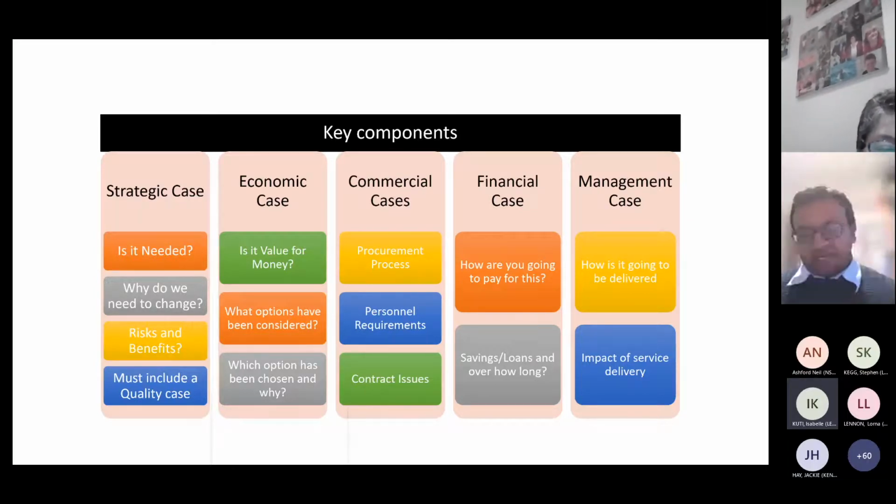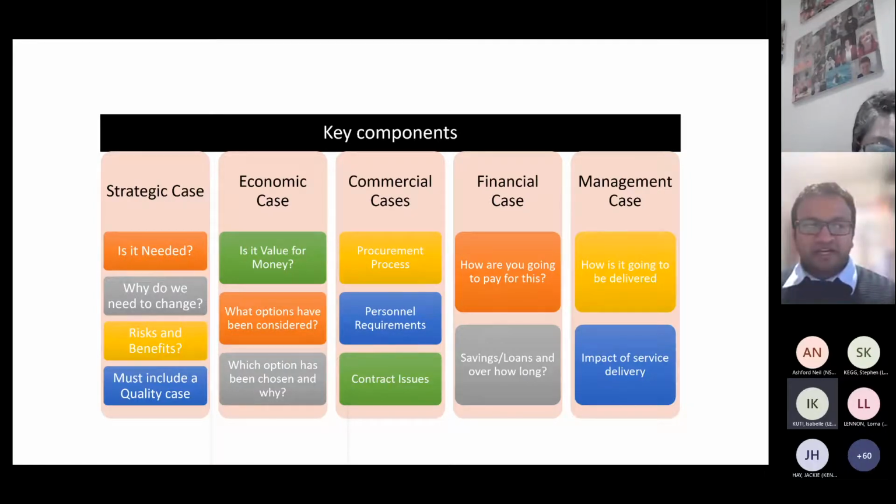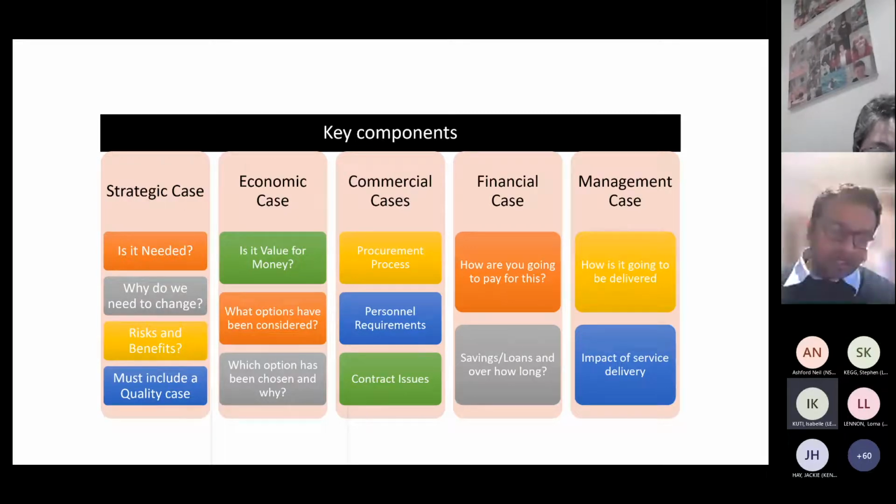When you're looking at personnel requirements, it's important to recognise that when you're looking at staffing, you need to factor in working time equivalents or full-time equivalents. Anybody on Agenda for Change contracts is based on a 37.5-hour working week, and for medical personnel, if you're looking for extra consultants, that's based on a 42-week year.